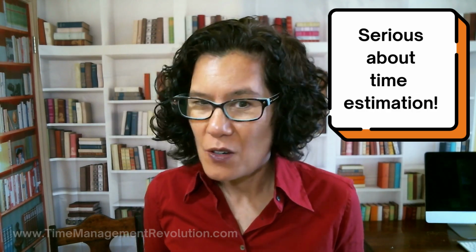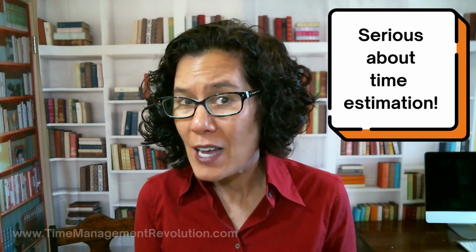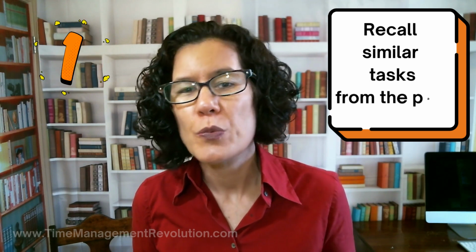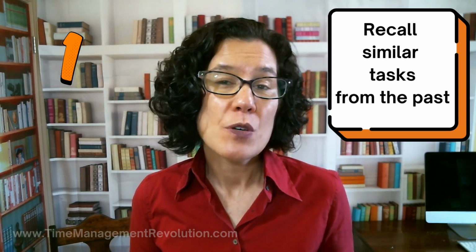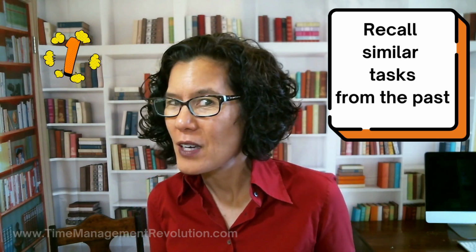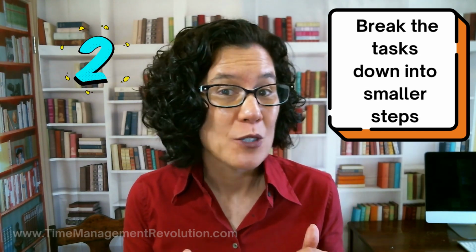If you want to get serious about your time estimation, which will help you exponentially when it comes to creating more realistic daily to-do lists as well as timelines for project management, here are some steps that you can take. Number one, recall similar tasks or projects from the past and how long they took to complete. You can use this as a rough estimate until you work through the following, which is step two, break the task or project down into smaller steps.